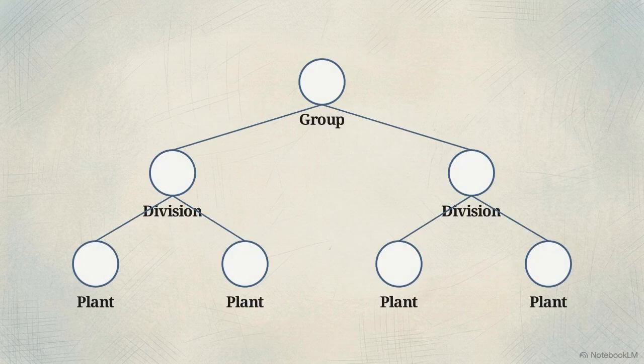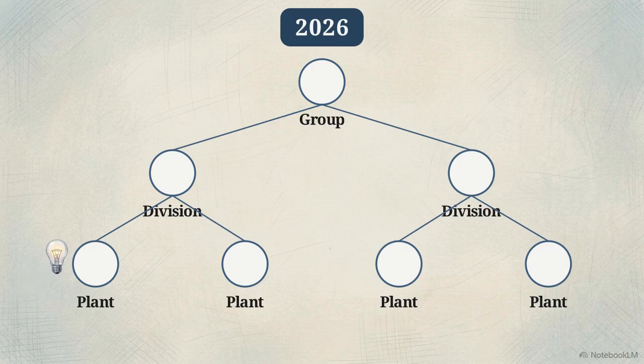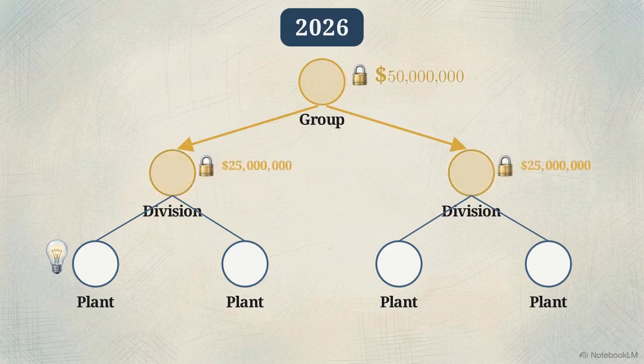Next, we map the request into the corporate project using an investment program. This node tree represents the organization's structure, from the group level down to specific plants. These nodes, or program positions, bind the investment to a specific approval year. Watch the approved appropriation request snap directly onto the leaf-level plant node of this hierarchy. This enables bottom-up planning. Requested project estimates roll up through the nodes, aggregating the total capital demand at the root level.